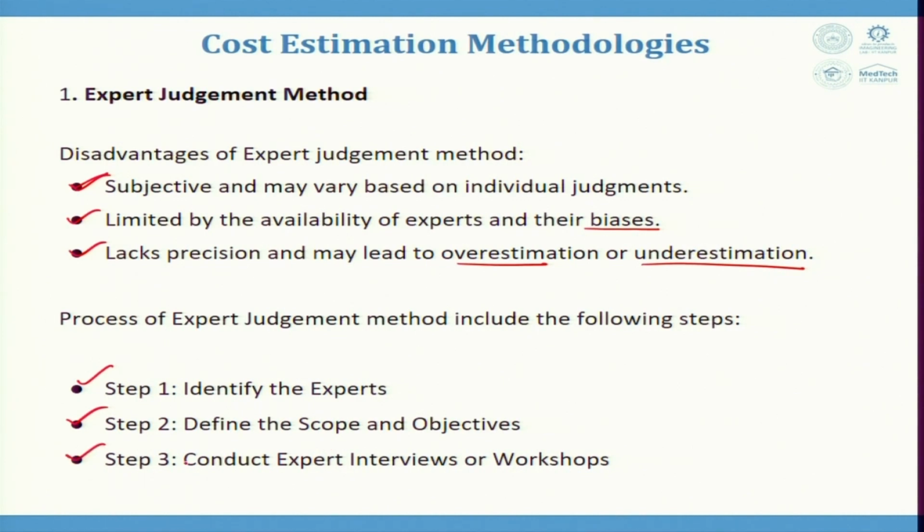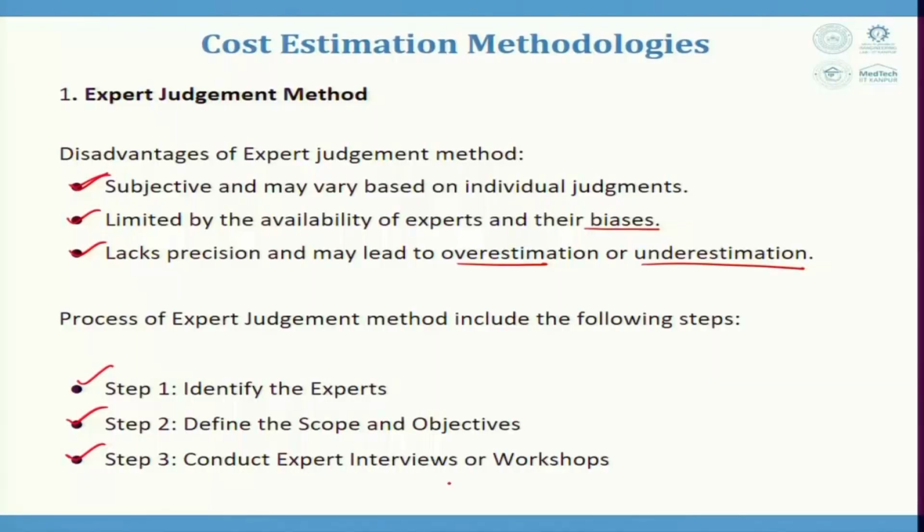Then we conduct expert interviews or workshops. That means to gather expert opinions on cost elements, we need to have expert interviews. The interviews of the experts, an important point, could sometimes be individual, because one of the experts could be influenced by another, more experienced expert. For example, the production manager has 20 years of experience in a big concern, and the marketing manager has 5 years of experience in the market. The 20 years experienced person could be more dominant in talking.